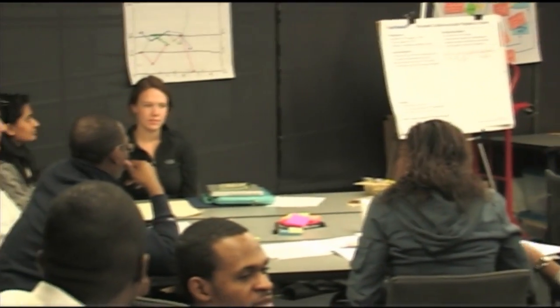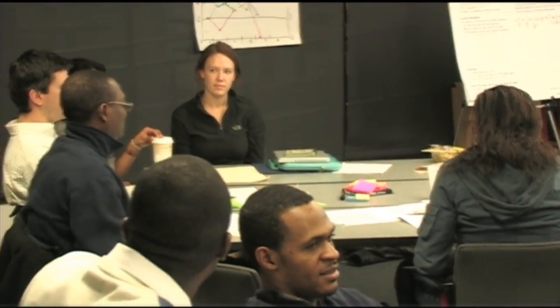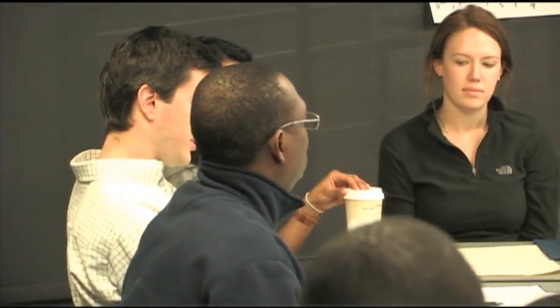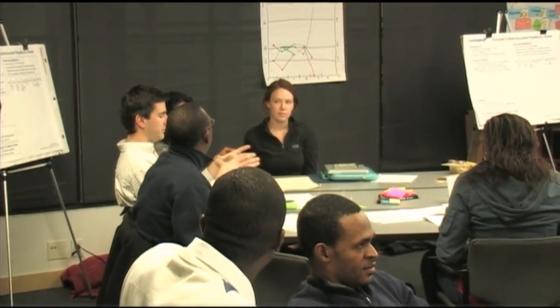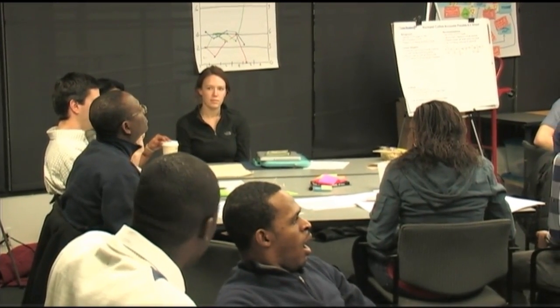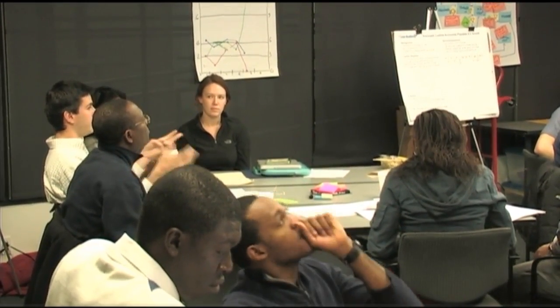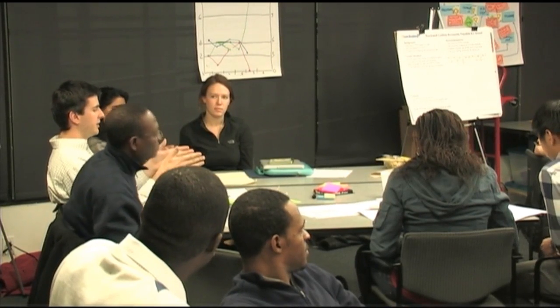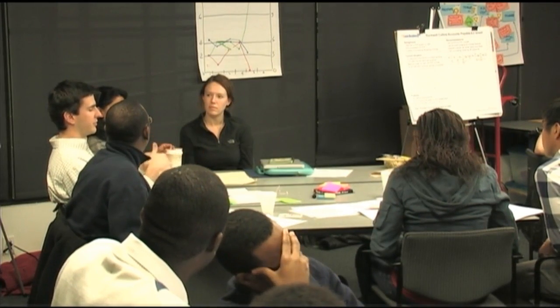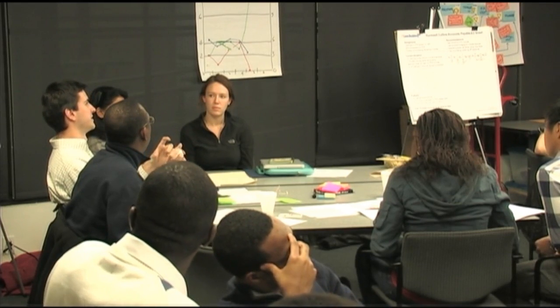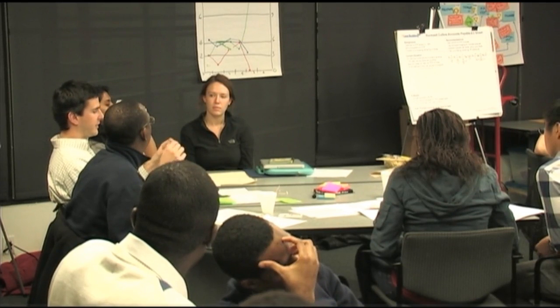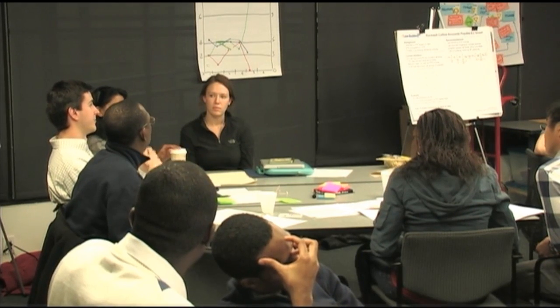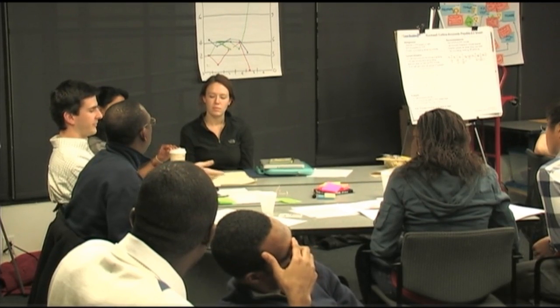Very good, thank you. Let's go around to the next group. All right, we focused on the implementation of the labeling of the first one, adding 5X's to the PFR invoices. We're going to have a small meeting with a representative from the mailroom, a representative from purchasing, and one of us who came up with these ideas, to decide what the format of this addition needs to be. Some suppliers' names or something in the address block might be too big, and you would never actually see the X's because they would move off the little window in the envelope, so we have to decide the best lettering to add on. The 5X's may not be the best.